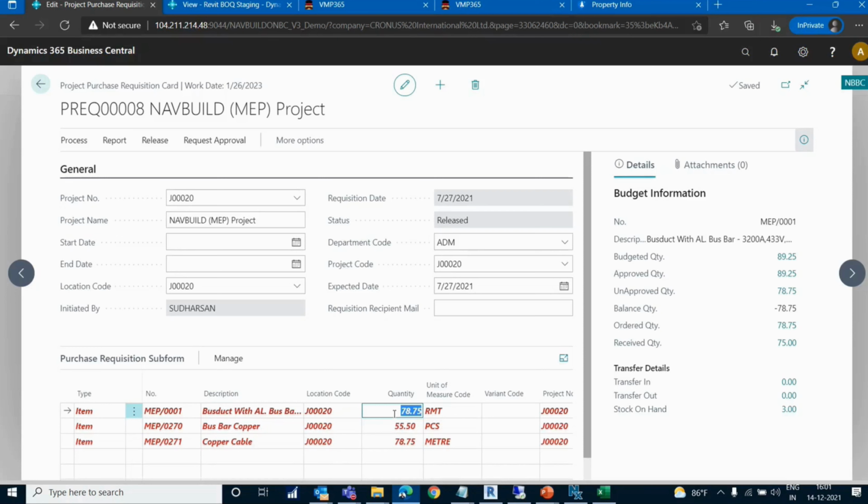And moving on to the material management. It starts from the purchase requisition, which comes from the project team, where the system automatically suggests what is actually required in the project. The system is going to suggest to the project team what material should be needed based on the start date and end date in the schedule which we have imported into the system.